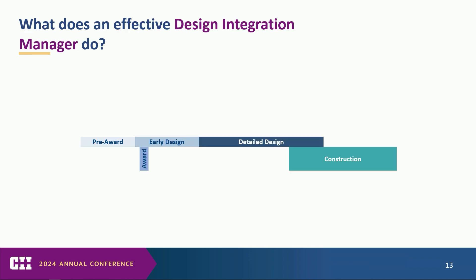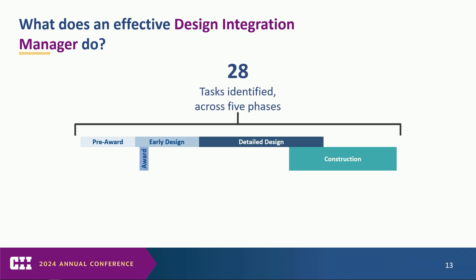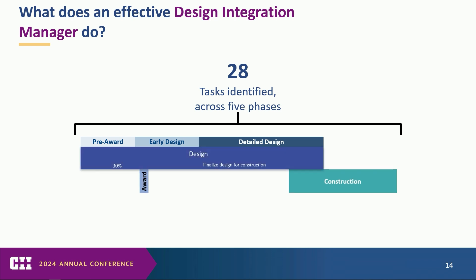What does this design integration manager actually do? We tried to break a project down into agnostic phases, because the EPC world is different from the building world. We identified five basic phases: pre-award, award, early design, detailed design, and construction. Phase names change a little depending on the sector. Across all those phases, we identified 28 different tasks. If we look at a traditional design-build process — not quite the progressive model Judy described, but a fixed-price design-build model — this is where those phases fall.